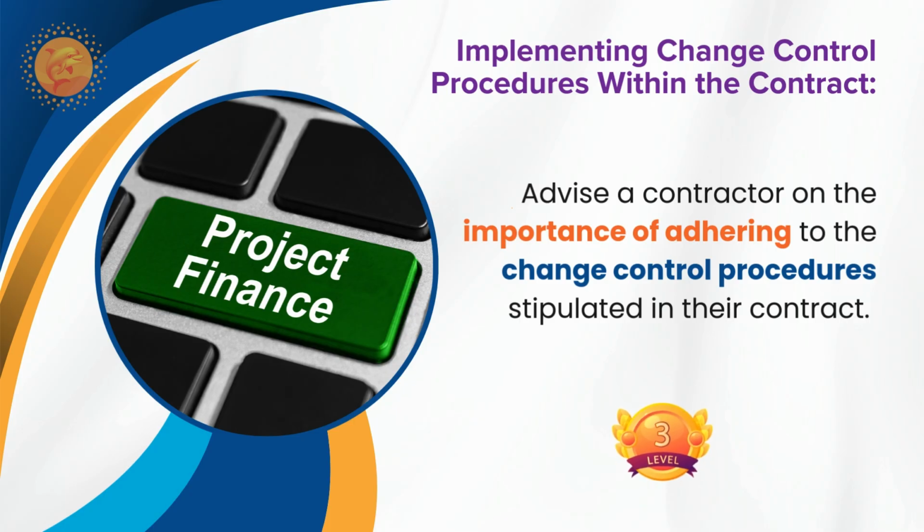Can I add something, sir? Yes, please. I will advise the contractor regarding the importance of adhering to the procedure, such as giving early notice to the employer, whether to go further with implementation of the change or not. Also, the contractor has to submit the cost and time implication for checking the availability of funds, or whether any borrowings are required for this change.